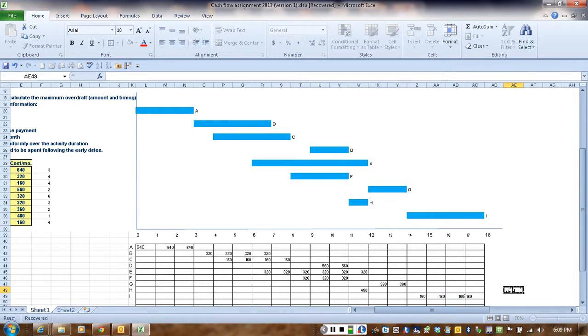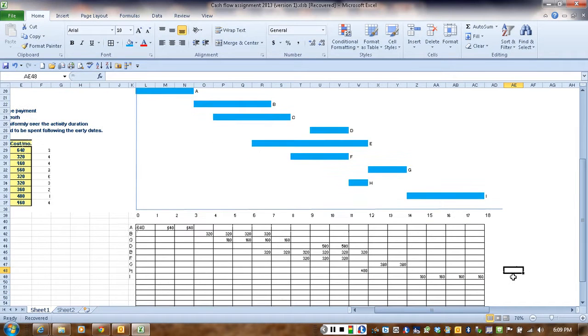These numbers can be in the thousands, by the way, so just to have large numbers. The next step is to calculate the totals. So total expenditure, I'm just going to add the numbers. So this is going to be the sum of the column above it, like that. And I'm going to copy that across. So now it's showing me on each day how much is spent.